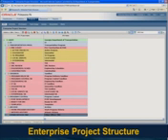Yes, sir. Yeah, so the question is, are there different security levels or access levels within the EPS? Absolutely. That's one of the primary functions of the EPS in and of itself, that we can assign users at any level within this EPS structure. And you can assign them at multiple levels. So we could give someone access at the very highest level, read-only access to those projects. And then for one specific node within that EPS structure, we could give them read-write access to edit specific schedules.